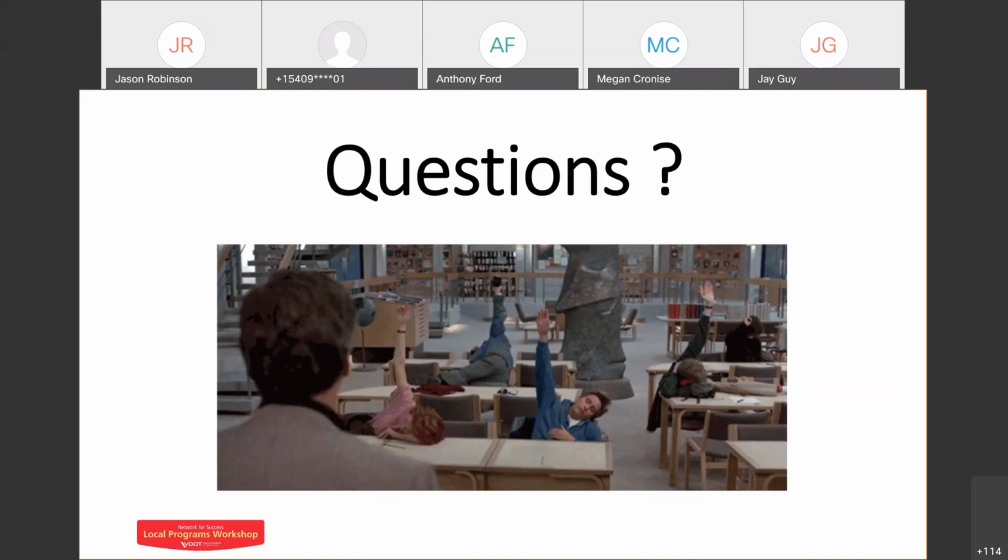I know Michael provided some input, and he might want to jump on this as well. This is Anthony. I'll just add that, Bud, yes, it can be the STARS program. For our district, the Salem district, we usually only get about 2 projects a year funded for planning studies through that program. And I think next year we really only have 1. So I would encourage folks, again, every district might be different, not to put all their eggs in that basket. We do have some planning funds available at the district level.